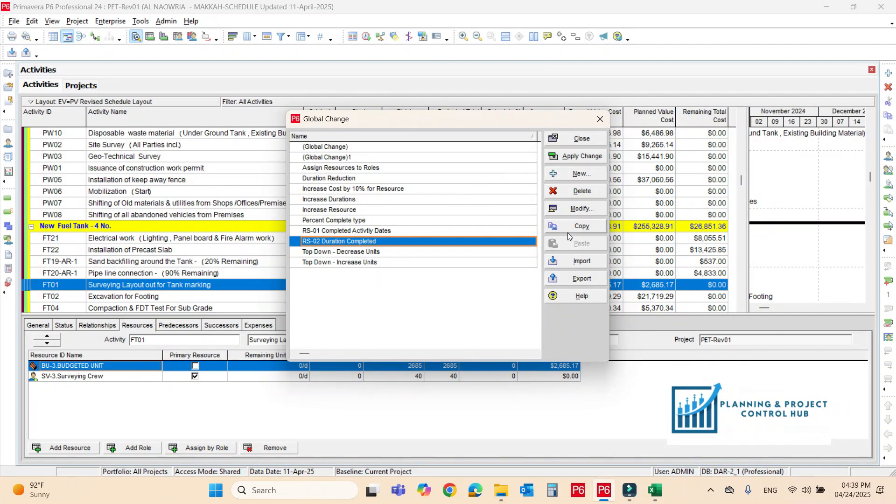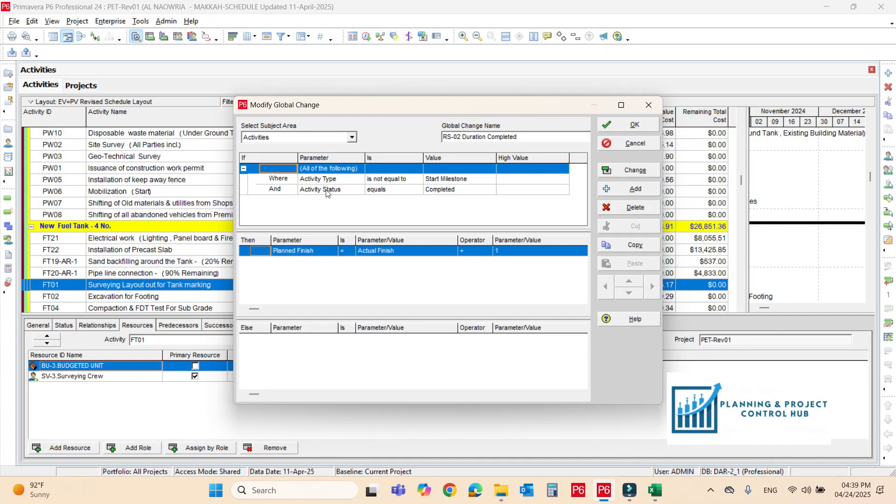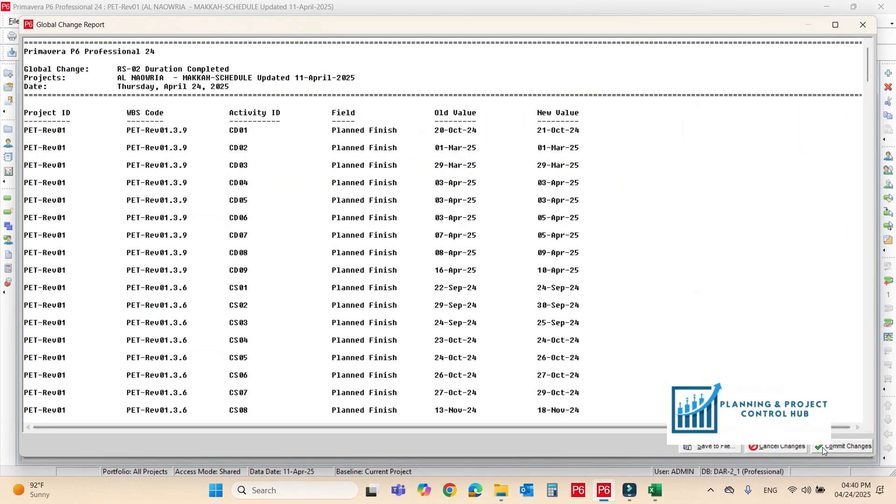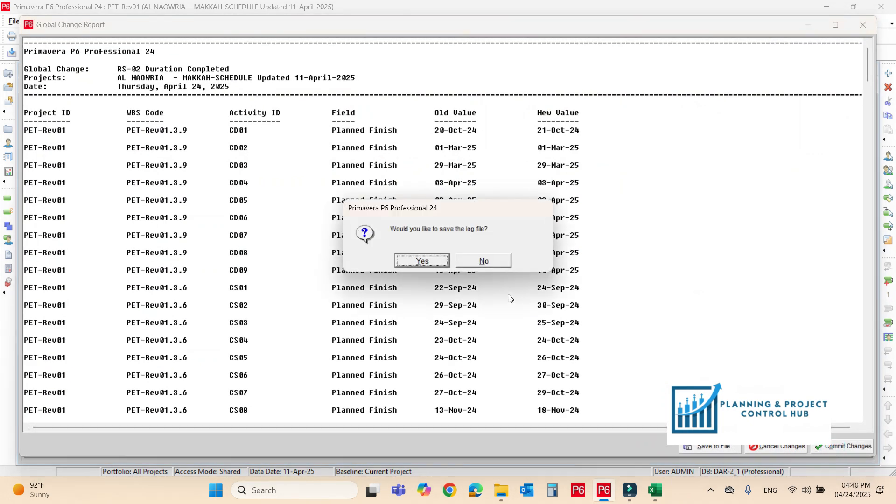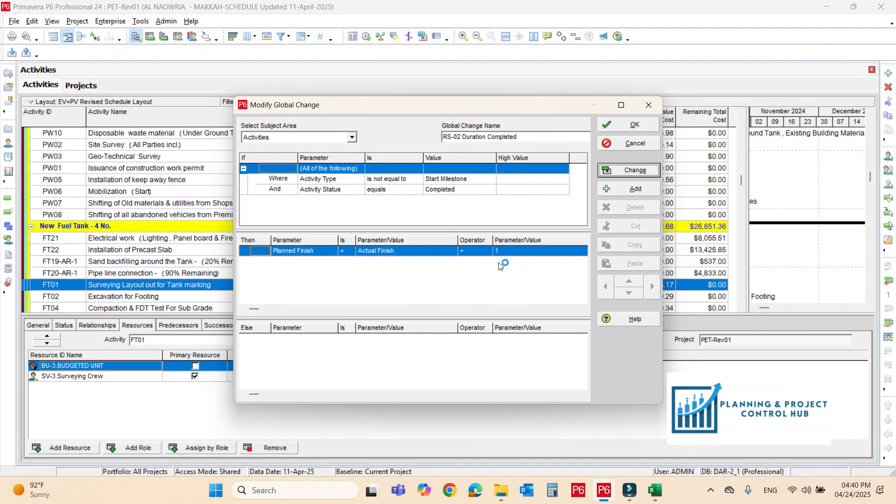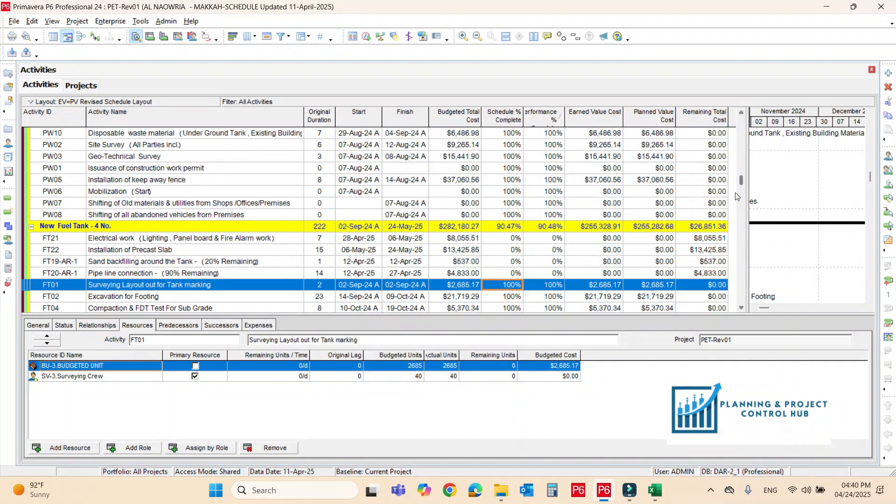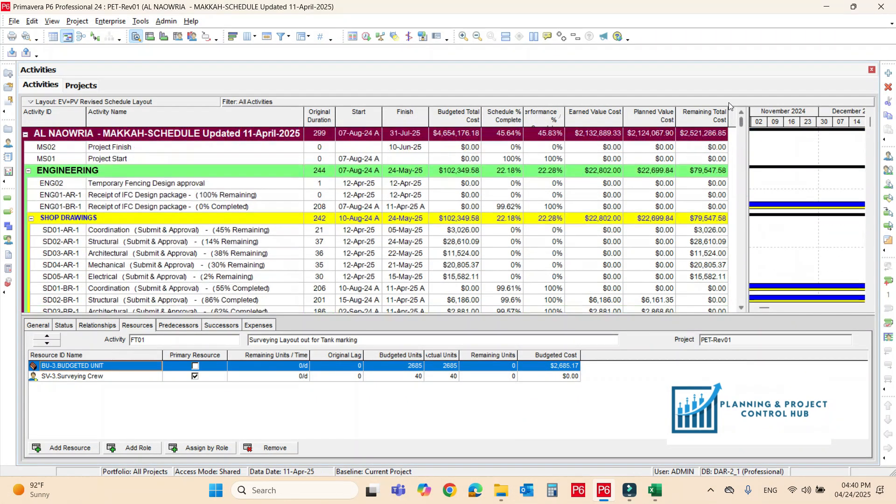Activity type is not equal to start milestone. Activity status is equal to completed and planned finish is equal to actual finish plus one day. I'll explain it better why I put the one. No less changes. Convert changes. No need to save the file. Close the file.